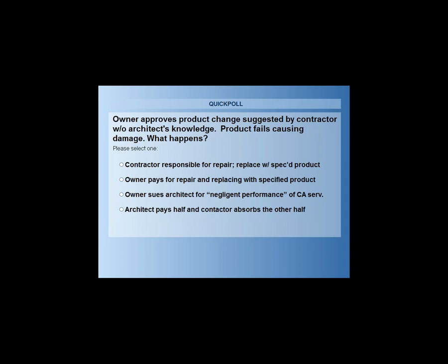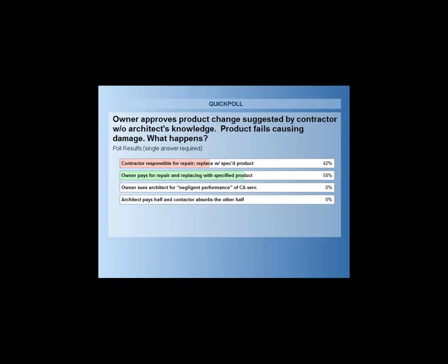As we were saying, depending on the particular facts and circumstances of the project, that one could go a number of different ways. Those options were not meant to be exhaustive, but again, just to help generate some discussion. Mainly to point out the importance of following the procedures that you establish in the contract documents. There are cases where you can have a change that's valid that the contractor would be entitled to payment for, even though an actual written change order was not in place.